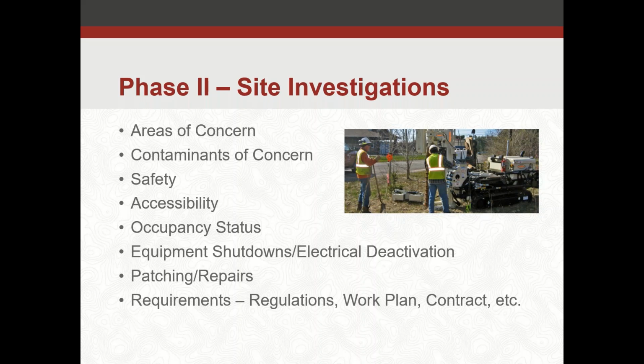You want to know what your contaminants of concern are. If you're dealing with a tank, you might not necessarily be sampling for asbestos or things like that. You're going to be sampling for petroleum-related contaminants. So know what your contaminants of concern are, and detail that in your sampling program.